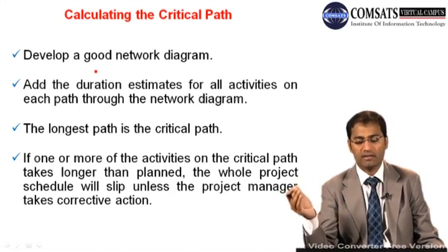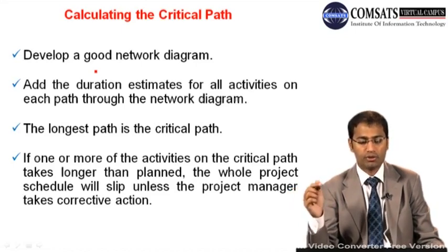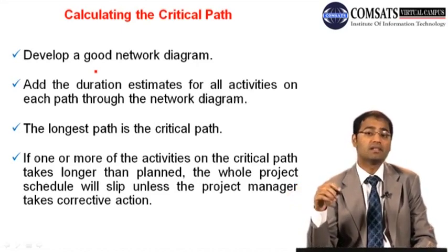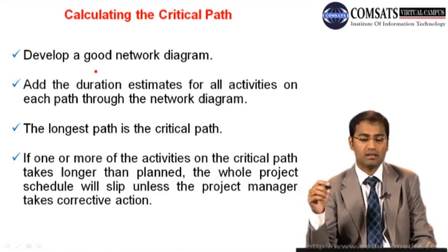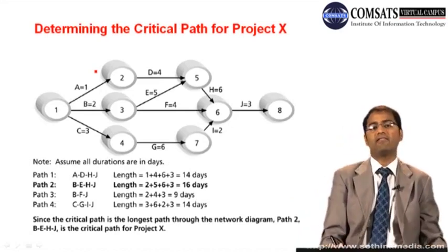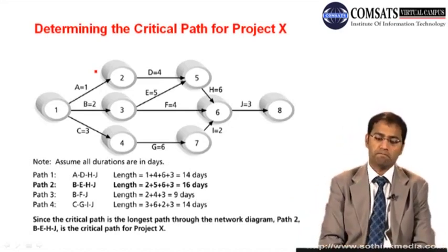If one or more of the activities on the critical path takes longer than planned, the whole project schedule will slip unless the project manager takes corrective action. So the critical path is important because you cannot delay anything. Okay, so let's have a very good example over there.